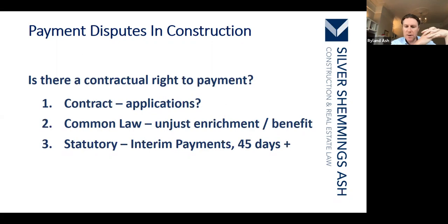Now, to answer the first part of that question, whether or not there is in fact a contract, one must apply the tests in law to the circumstances. And the tests are whether or not there is all of the essential ingredients for a contract. So offer, acceptance, consideration, an intention to be legally bound, and then terms and conditions ideally. So you're looking for all the essential terms, and there'll be the scope, the price, and hopefully some sort of provisions in terms of timeframes. And if you've got all of those ingredients, then it's likely that you've got a contract.